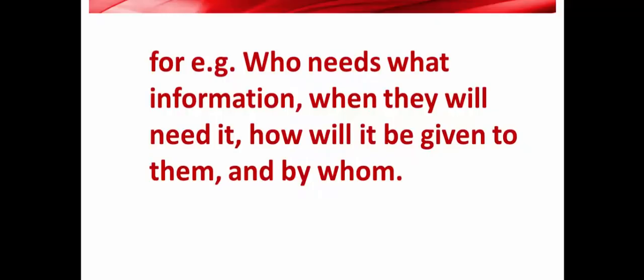Vital questions to be asked in managing communications include: who needs what information? When will they need the information? How will it be given to them? And by whom? So several questions to be answered. The project manager and his team must sit down to come up with answers to these questions, because if care is not taken, there will be lots of alterations during the project execution.